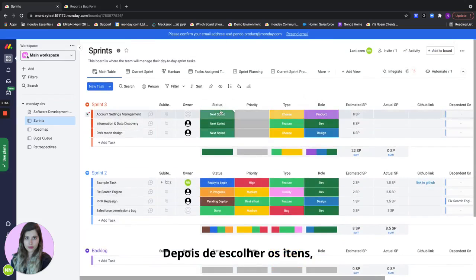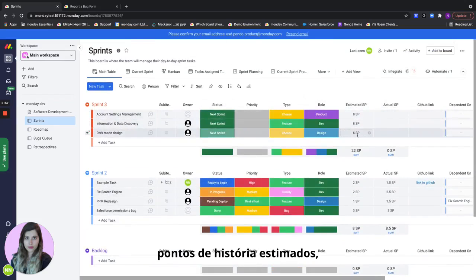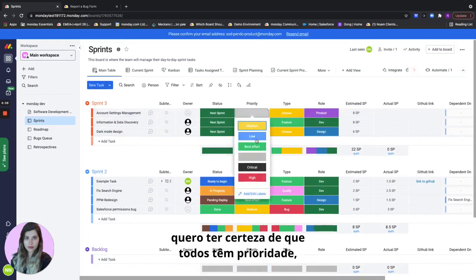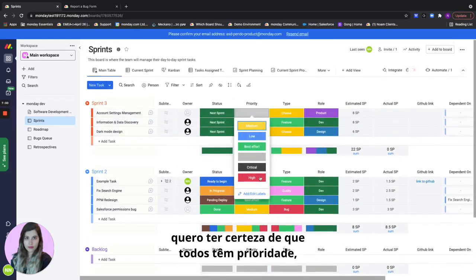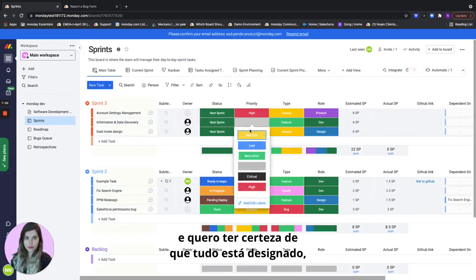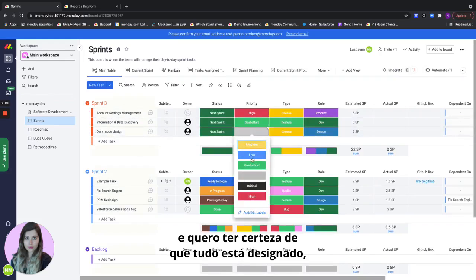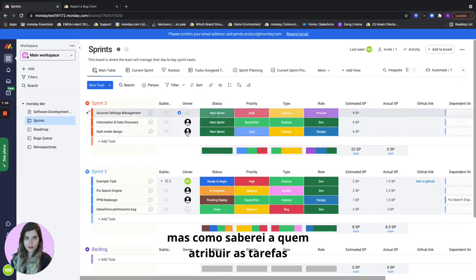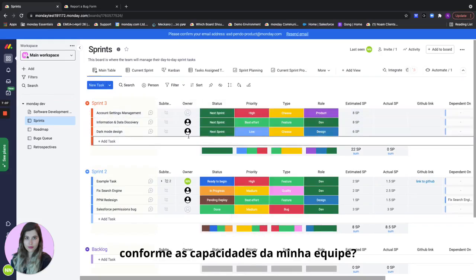Once I've chosen the items I want to make sure they all have estimated story points, I want to make sure that everybody has priority, and I want to make sure that everything is assigned. But how will I know who to assign the tasks to based on my team's capacity?